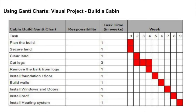The remaining tasks are sequential, meaning you've got to install the foundation and the floor first. Before you can build the walls, you have to have the floor finished. Before you can install the windows and doors, you have to have the walls up. Before you can install a roof, you have to have the walls up and the windows and doors in. And before you can install a heating system, you have to have the thing built. So what we're seeing with the Gantt chart is a schedule for the tasks and an estimate of the time it takes to do each of those tasks.